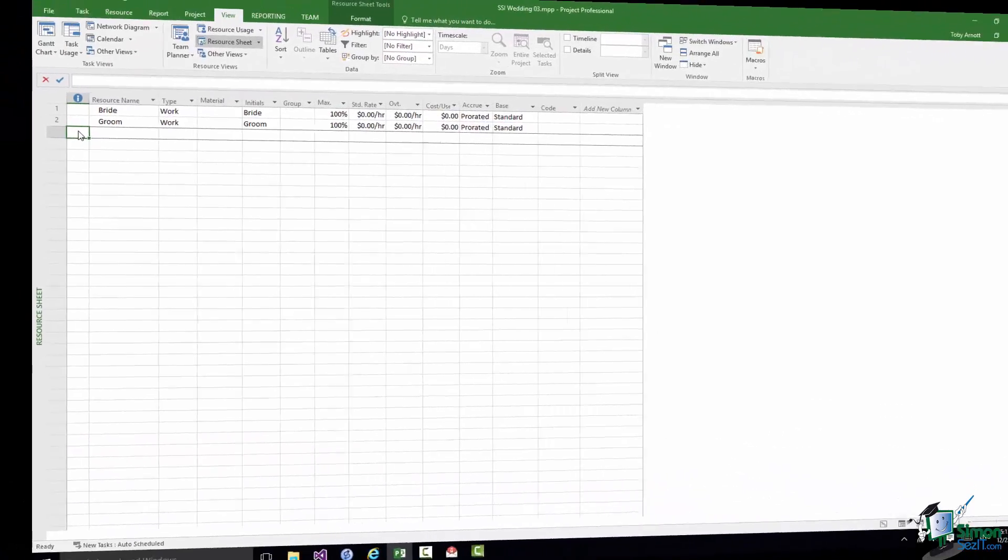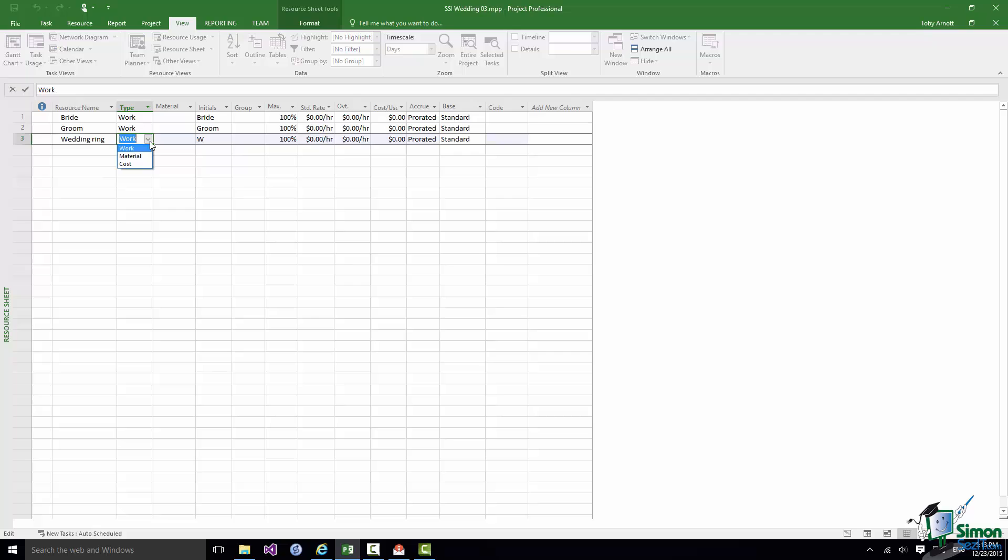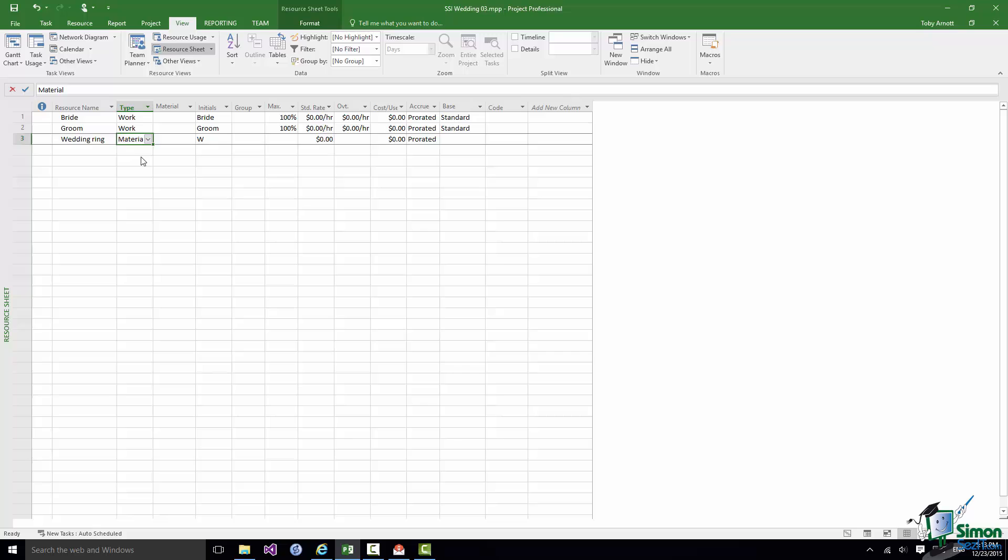The next resource I'm going to set up is a little bit controversial really. I'm not really sure you'd do it this way but you certainly could do it this way. I'm going to add a resource wedding ring, and I'm going to say that it is a material resource. You could actually work it that way. It may seem a little bit heartless in a way but let's call it a material resource. And I'm going to give it an initials of ring.